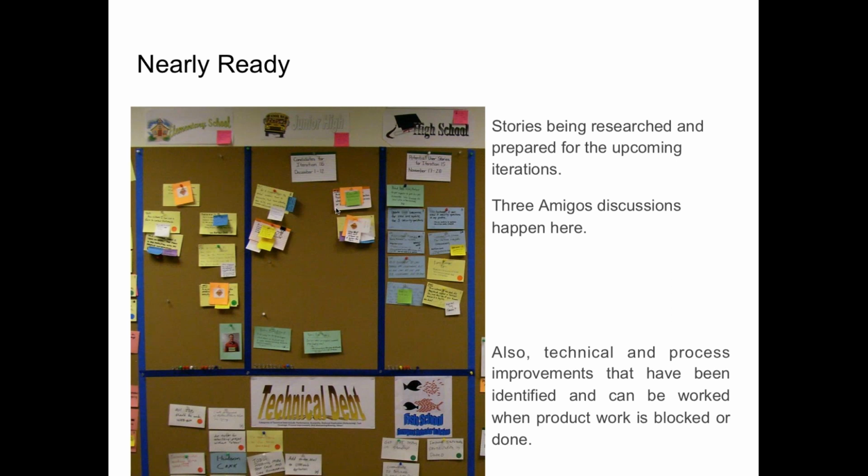And that was a really important thing, because they're building their current iteration, they're keeping busy building stuff, but if they end their sprint and they don't have work to work on, then they'll hit a bubble that they won't be able to work anymore. So they always spent part of their current sprint making sure that they had enough work ready for the next 3 sprints.